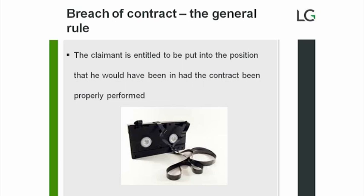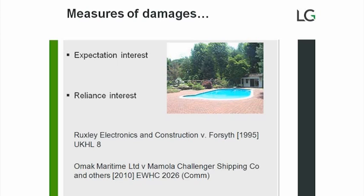There are three distinct measures a claimant may rely on to measure damage. The first is the claimant's expectation interest — looking forward and reflecting the financial gain or benefit the claimant would expect to receive had the contract been properly performed. Typically in a commercial contract this would be a loss of anticipated profit. A claimant's expectation can be quantified by reference to the cost of cure or by reference to diminution in value.